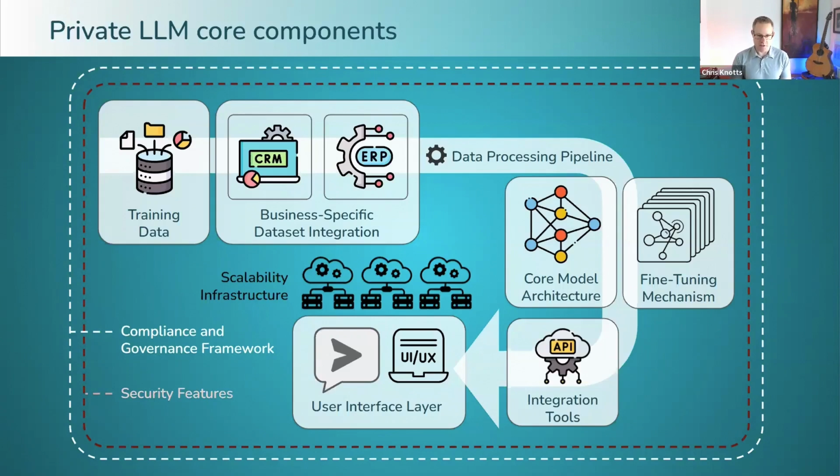In terms of modeling costs and OpEx, those are two slightly different scenarios, but I think the modeling is really pretty straightforward. The compute resources, the chipsets, cooling needs: these things are all fairly well known. It's pretty commodity stuff, so you can model costs. You can break down those costs and those usage metrics per user, per token, per amount of data, per session, per time period, whatever. But cloud, on-prem, private data center, or even some kind of hybrid, depending on how your data is being handled,